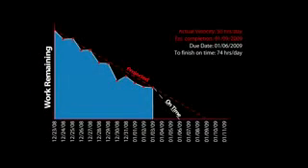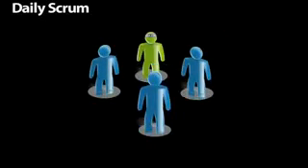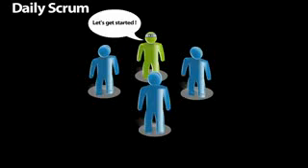Let's quickly review them. In Scrum, you work with this, a product backlog, which is nothing more than a list of features. You then break down the product backlog into 1 or more release backlogs, and for a given release, you further break up the release backlog into a number of sprint backlogs, which are essentially short duration milestones throughout your project. You then monitor the progress of each sprint using these, burn down charts. Depending on your team, you might want to have daily Scrum meetings to ensure everything is on track. That's all there is to it.